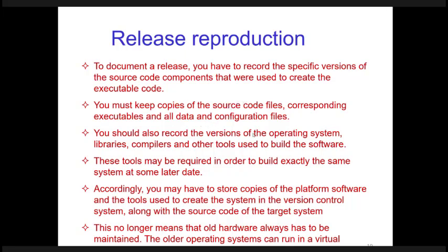The component versions, data files, configuration files, operating system versions and compiler details, all these should be documented and those copies should be made available for the future. So they are required to build the system exactly in the same way at some later time.